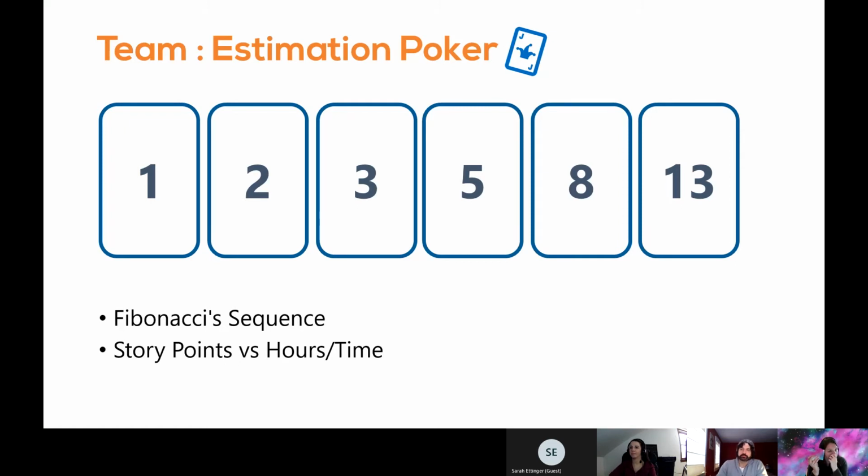I'm holding it up. But there's this idea that you have a task or an activity that you're doing, and you want to get everyone to weigh in blindly on how long it's going to take and do it instinctually. So the way estimation poker works is usually you have cards. It can literally be a sticky note or a piece of paper, but you give everyone a 1, 2, 3, 5, 8, 13. If you are in the development space or software development, sometimes these are called story points.